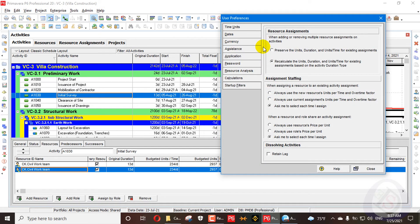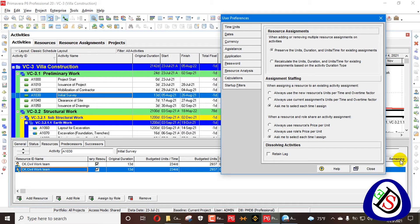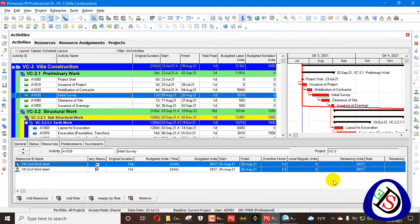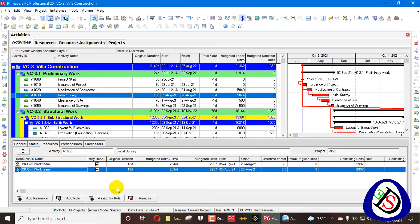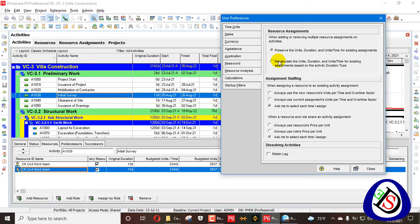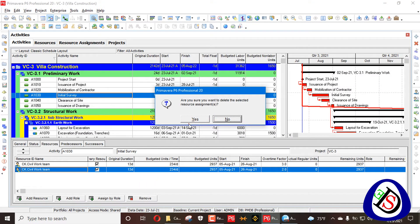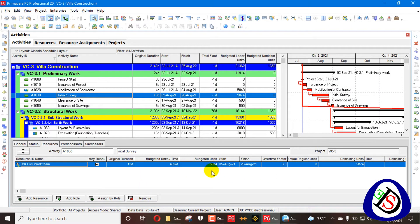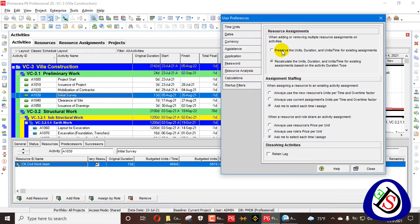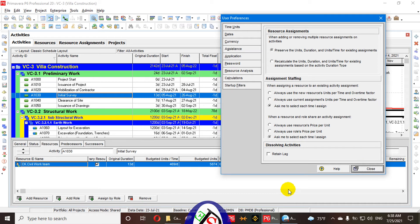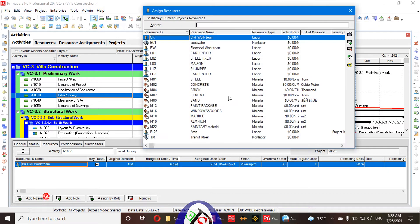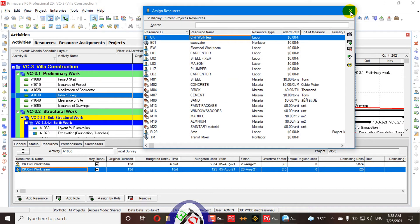There is also an issue with recalculating units, duration, and units per time being fixed. We go here and preserve that one. First we remove the preservation — because if you preserve when you delete, it will also delete — then we preserve the value 55874, and now close and add. The Civil Work Team layer is added.